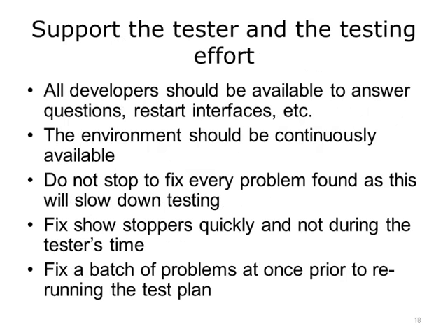Testing is a tedious process, so allow the testers to do their work efficiently by providing a stable test environment and immediate support when needed. Also, testing is more efficient when you do not stop to fix every problem found. Fix showstoppers quickly and not during the tester's time. Fix a batch of problems at once prior to rerunning the test plan.